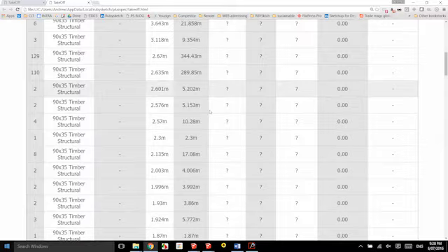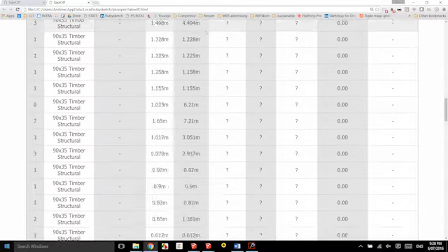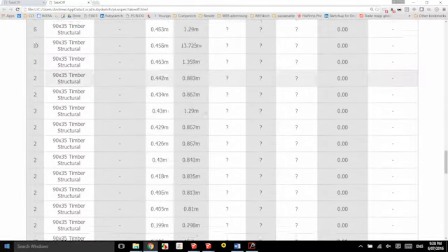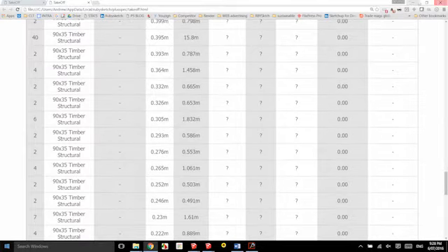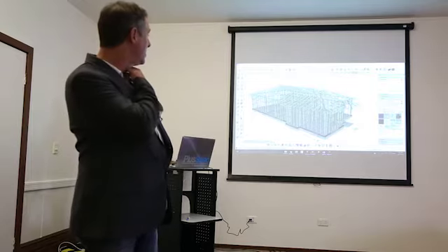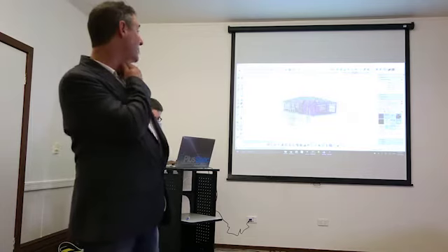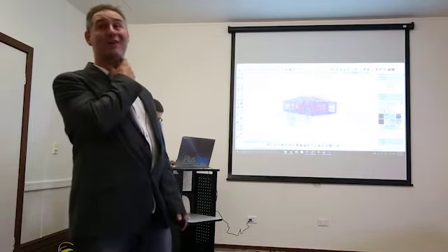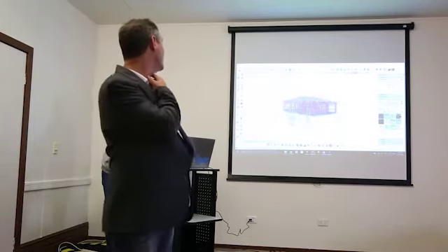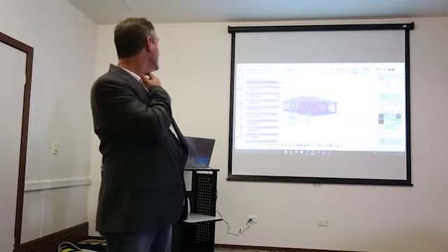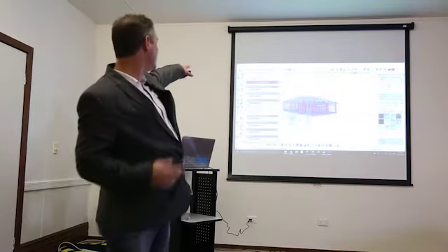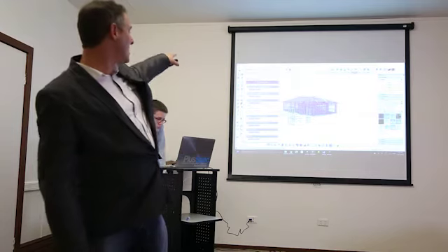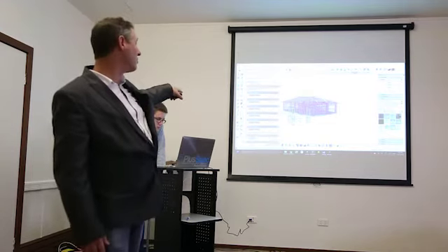The best thing to do would be to hand it on to a builder and let them put the prices in. But let's pretend that Grant's a builder. Grant, can you go back and put in some prices for me, please? I know that 9035 is about $2.45 a metre, and I know that it costs about $1.20 a metre to fit. Go back to your prices. Go to your 9035. You notice that basically it's come up with everything that's associated with a wall or a roof.